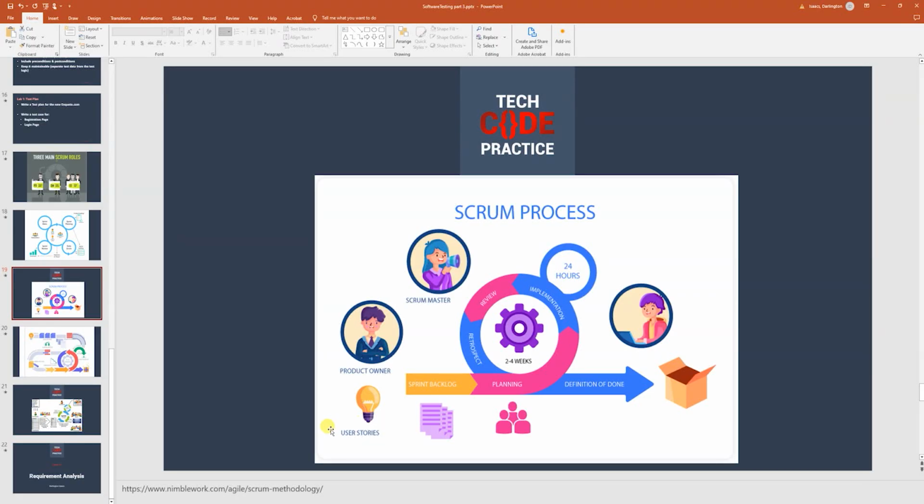What the product owner does is say, okay, for these next 2 weeks, we're going to work on 1, 2, 3, 4, 5, 6, 7 user stories, and he puts them into what you call a sprint backlog. A sprint backlog is basically a task board, like a group. We're going to see that, and then you plan the sprint. When you plan the sprint, everybody agrees, remember, we saw that plan.